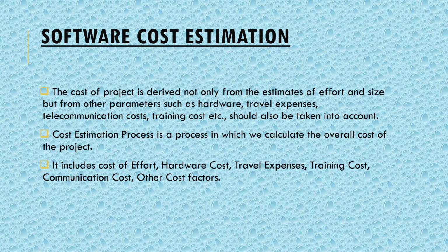Software cost estimation is a process in which we calculate the overall cost of the project. That means we are calculating the entire cost that will occur in the development of the project. It includes the cost of effort, the cost of hardware, all the training cost, all the communication cost, and the travel expenses, etc. So the cost of the project is derived not only from the estimates of effort and size, but from other parameters such as hardware, travel expenses, telecommunication cost, training cost, etc. They all should be taken into consideration.